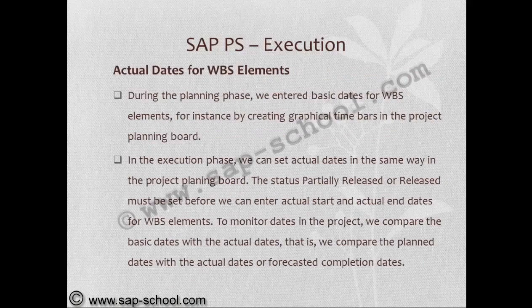Now we'll start with the actual dates for WBS elements. During the planning phase, we entered basic dates for WBS elements, for instance, by creating graphical time bars in the project planning board. In the execution phase, we can set actual dates in the same way in the project planning board. The status partially released or released must be set before we can enter actual start and actual end dates for WBS elements.